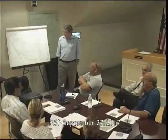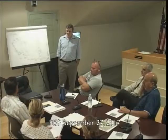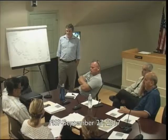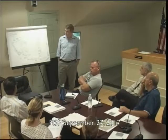That's good. I don't know how bad it looks now, but I know it did look bad years ago, so I can't imagine it's much better. It's broken up. Yeah, it's pretty bad. Right, but it isn't taking heavy traffic now. It probably won't take much more than normal residential vehicular traffic in the future, and you could do that under a town contract, which most towns have as open paving contracts. Whatever the price comes in at, you might have an open contract for a better cost and be able to do it more efficiently, I think cheaper. We should lean towards doing it, but let's wait till we get the numbers.